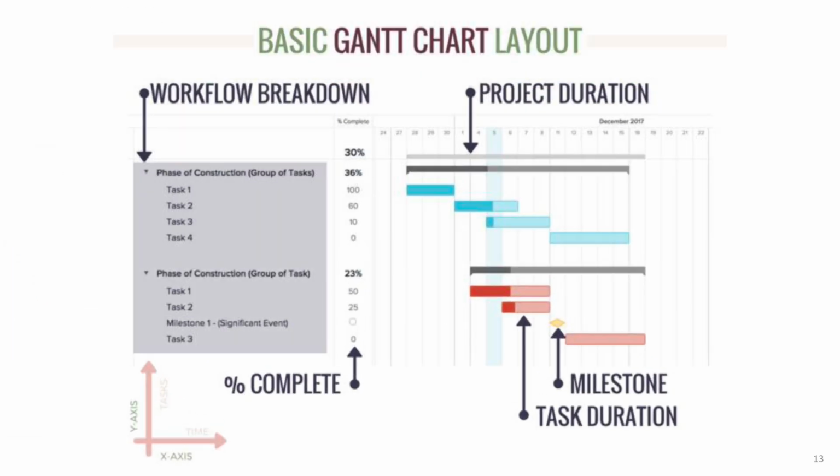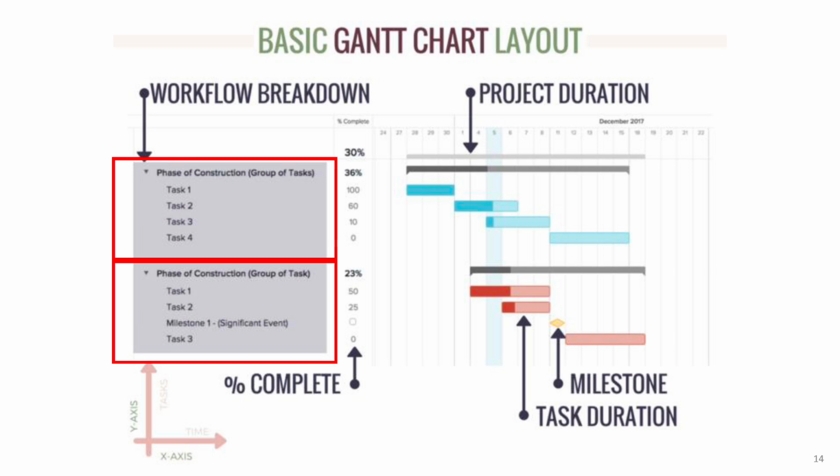And for larger projects, you might want to divide the activities into separate groups based on different project phases. Then, you can order the activities in each group chronologically. And remember, the order of activities within one group may not depend on the activities in other groups. You can also use an additional bar to show a summary of a project phase. The length of this summary bar represents the total duration of that phase. In this example, the project is split into 2 phases, so you'll have 2 separate summary bars to represent each phase. Finally, you can create another bar to represent the summary of the whole project.